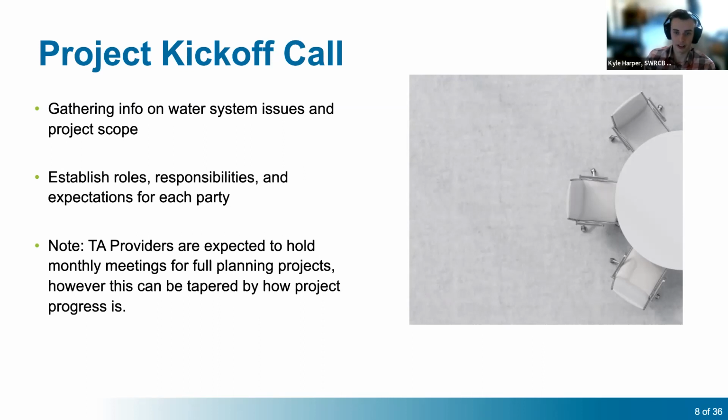I also just want to point out it is expected for full planning projects to hold monthly project meetings. This can change though, depending on how the project is progressing. But the initial requirement on our end is we would like the projects to be scheduled for monthly meetings. And then if everything is progressing smoothly, then we can taper off those meetings to less frequent intervals.